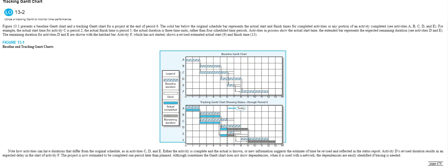Okay, so there's a couple of reasons for setting the baseline. One is for reporting, because you can't say anything about progress to plan unless it's clear what the plan is. It's set in stone. That's what baseline means. So the baseline is put in place, it's signed off by all stakeholders, it's used for ongoing reporting of progress, and it's used as a basis to consider a change request.